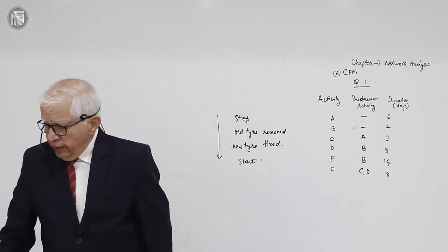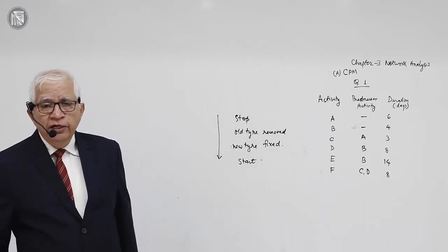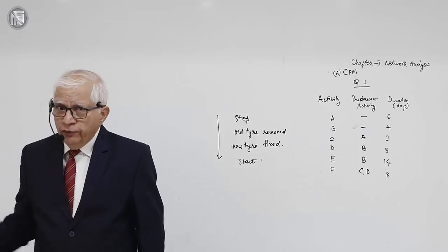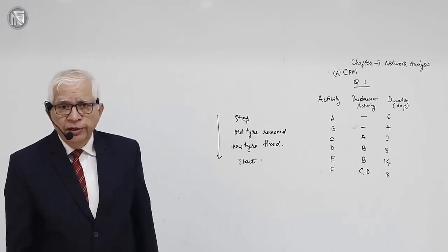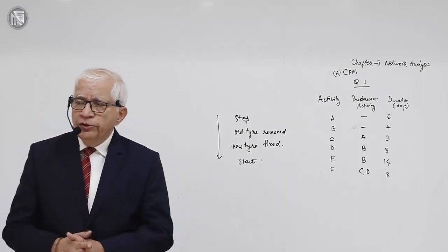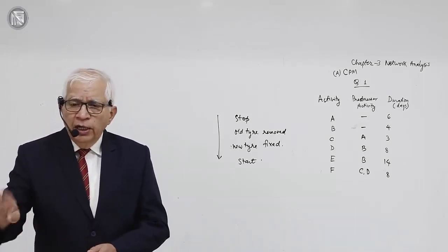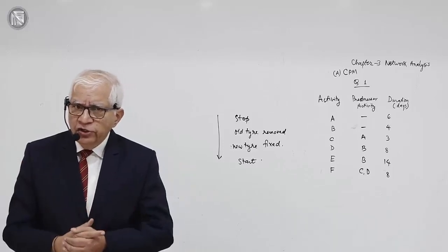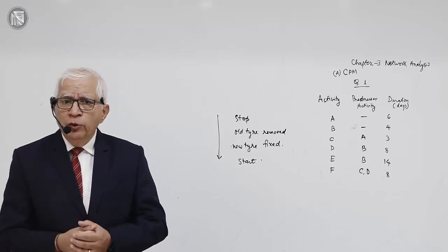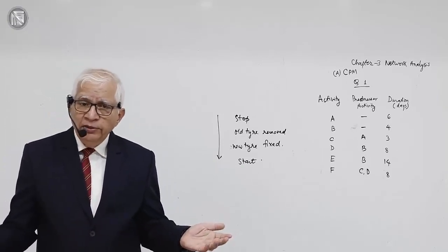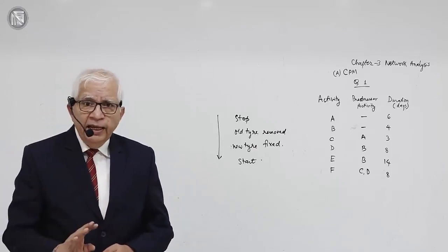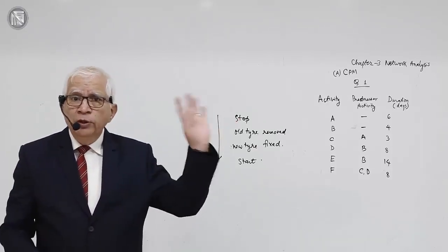Okay. So this is the distinction between sequential and parallel activities. Sequential activities must follow a certain logical sequence. Parallel activities are those which can be done at the same time. For example, when you are setting up an industrial project, the physical construction of the work is already on. Now you are required to obtain certain approvals. Some approvals are required before the residents start shifting in, so it can take time. Simultaneous with the work, the approval process can go on.